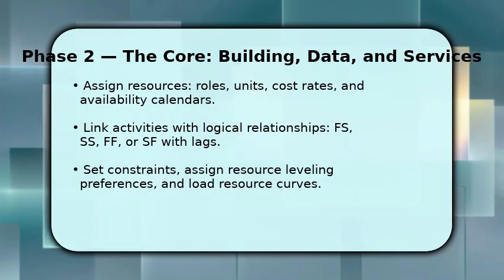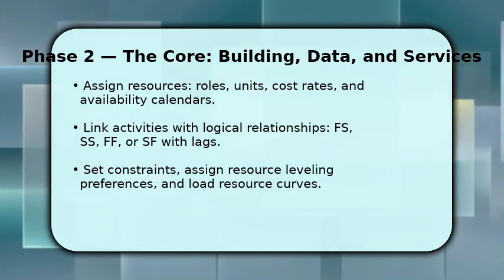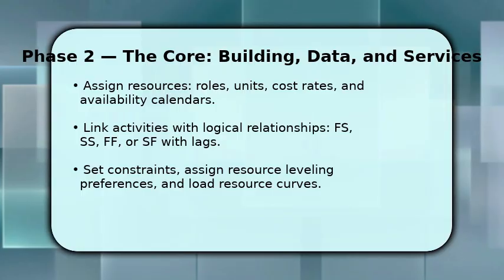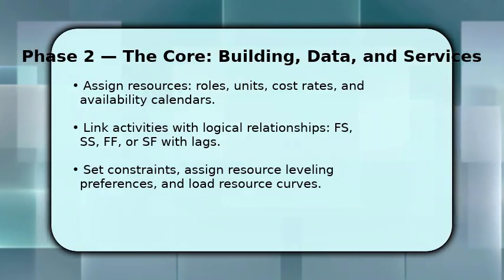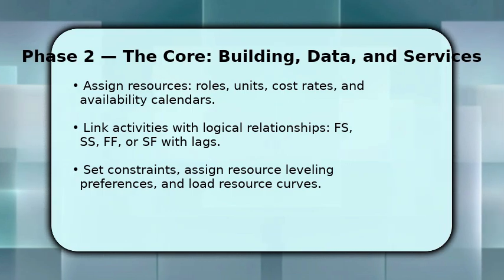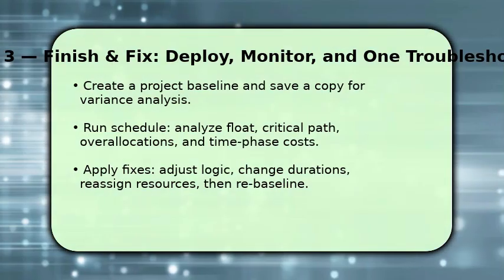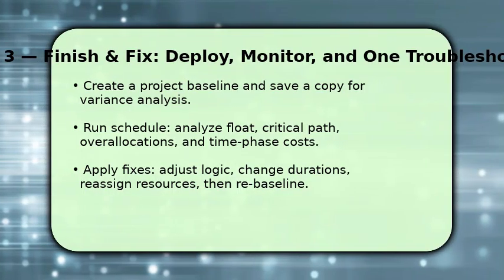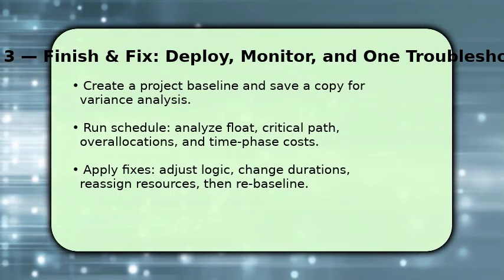Make sure to set the primary calendar for resources and choose the correct curve shapes. This affects cost and allocation. Save and run a preliminary schedule to reveal conflicts. You must create and save a baseline before publishing. This locks your plan for comparisons.